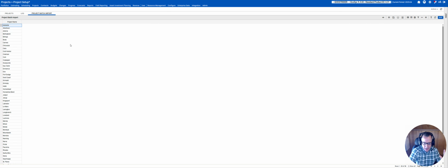And a little thing I discovered in the course of doing this is that when you import from a file into EcoSys, there's an innate rule that there have to be at least two columns in both the spreadsheet and the file you're importing where the captions, the headers, match. At least two. Well, I wanted to keep it as simple as possible, and I was interested to see, could I do this with just a flat list?